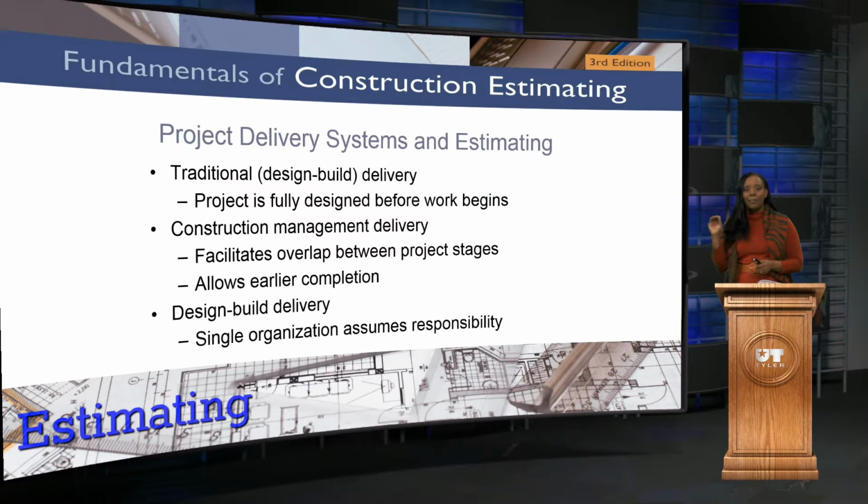And we know our project delivery systems, and we went over this in Intro to Construction, but there's going to typically be what's called your traditional delivery method, where you do your design, bid, build. Here you have a project where it's going to start out with your owner and also the designer being hired, and then you're going to have the contractor that's going to come in to bid on that particular project. Then we have the construction management delivery method, where the construction manager can be somewhat of a consultant to the owner,